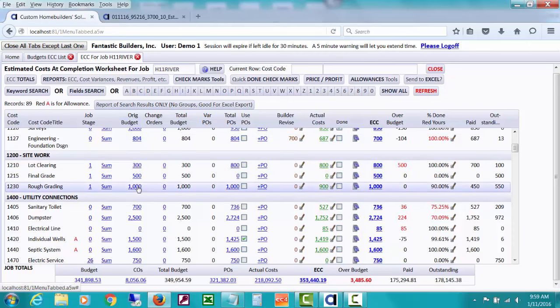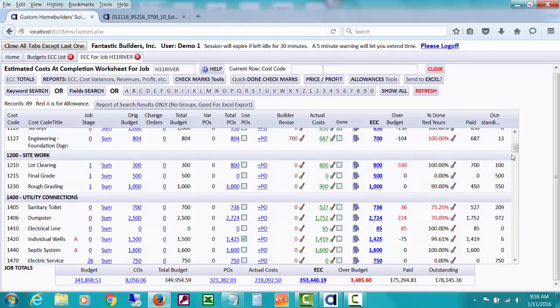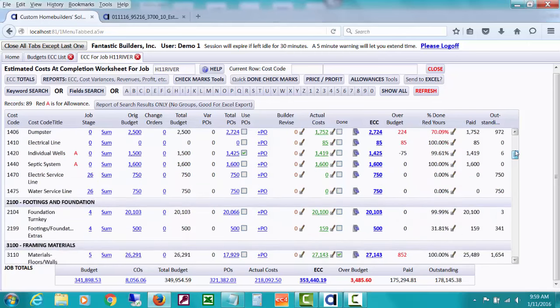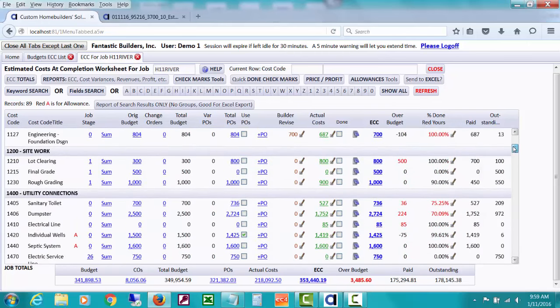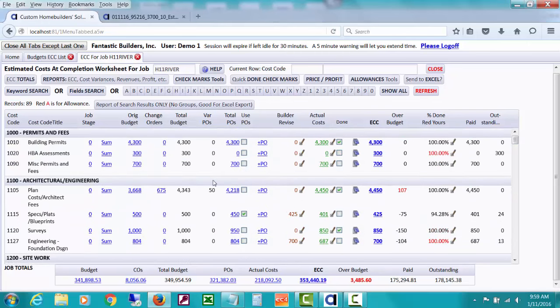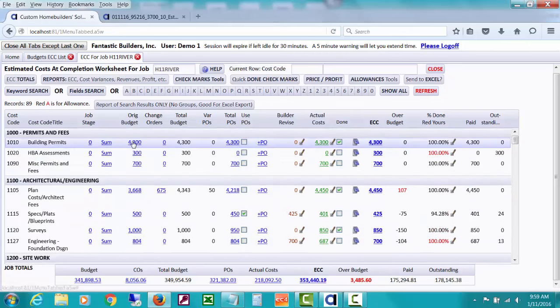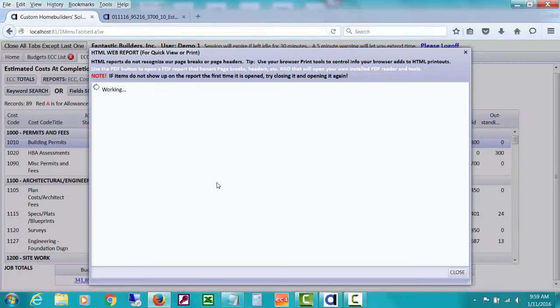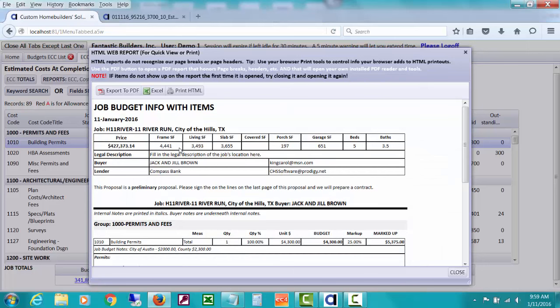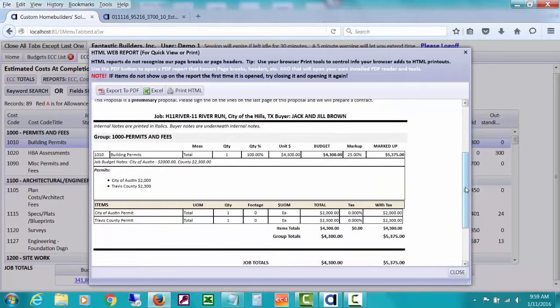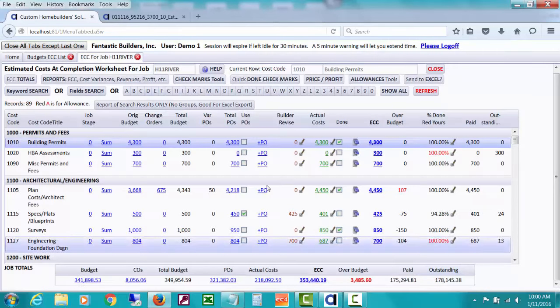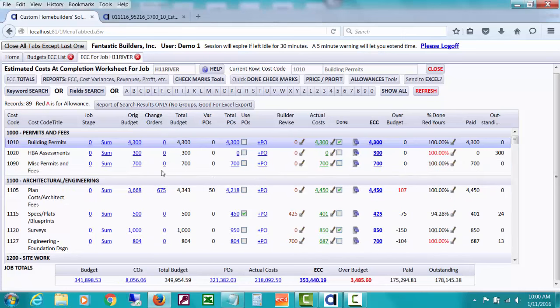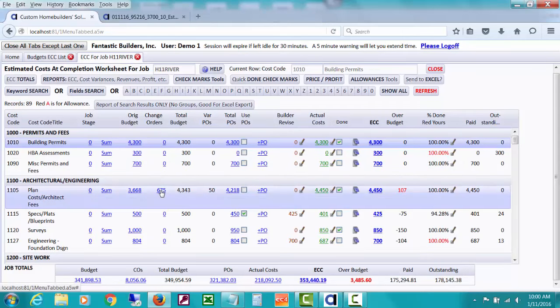This first column is your original budget. If you drill down on it, which you can do, you can see various notes that have been written. You can see how it was calculated. You can see the various measurements for the job. You can see the building permits, what they were made up of, because you can see the detail here. You can also see if there are items behind the budget that were built. If you've watched budget videos, you'll see that you can set up items behind a budget line. And so you can see the detail of that right here from the estimated cost of completion window.